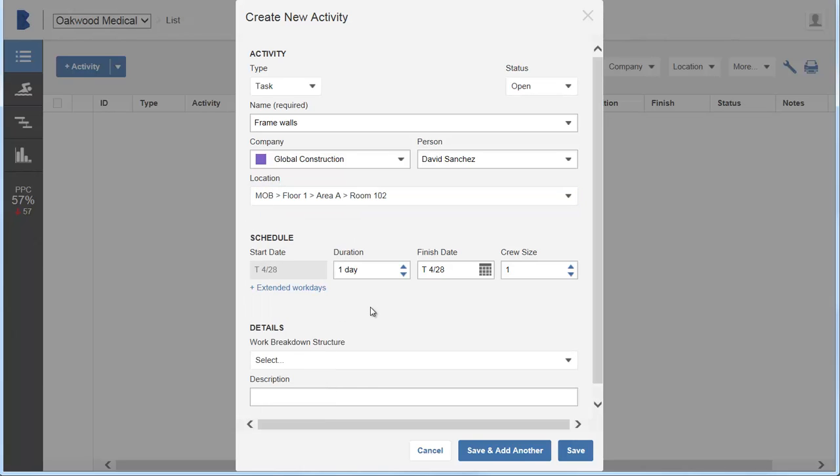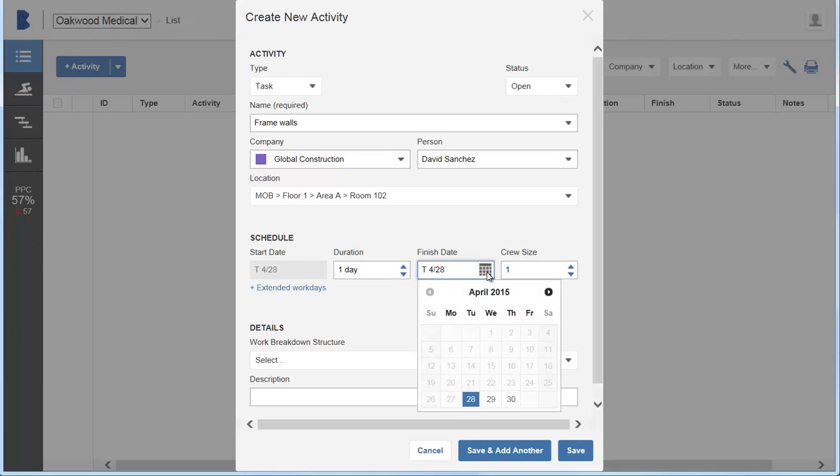The work schedule is defined in the administration settings. Duration, finish date, and crew size are also preset. You can adjust them as needed.